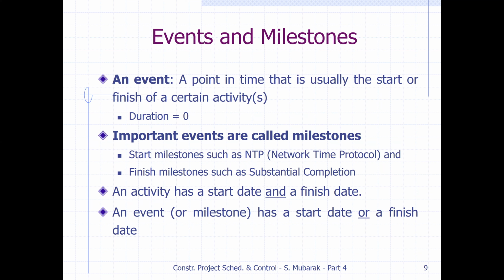Or in a multi-story building, we can say we will complete the ground floor up to this point, the first floor up to this point, and the third floor up to this month. We can put milestones this way also. An activity has a start date and a finish date. For example, this activity will start on this date, take maybe 10 days, and finish on this date. Every activity has a start point and an end point.